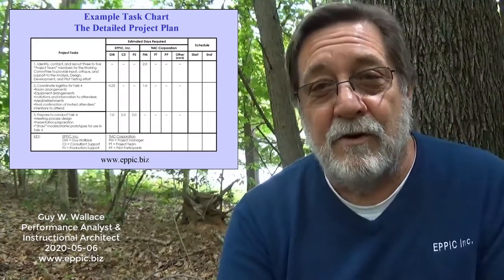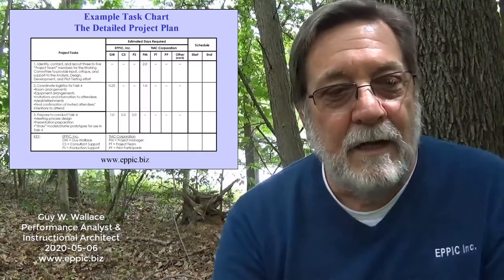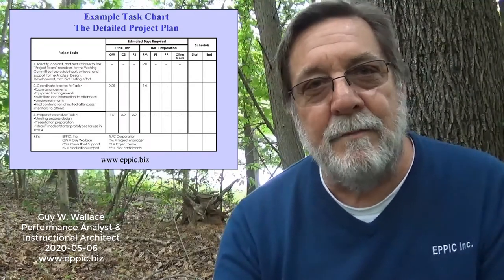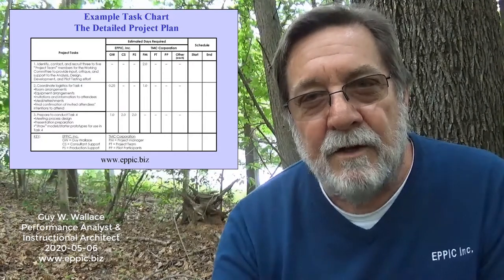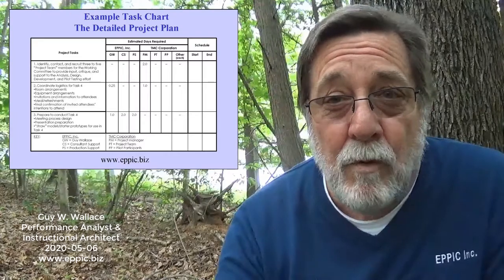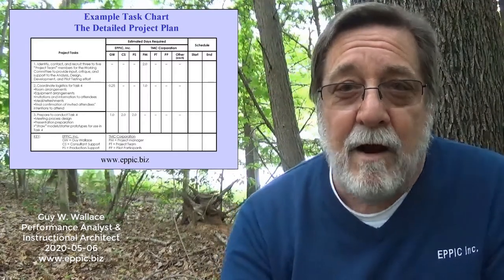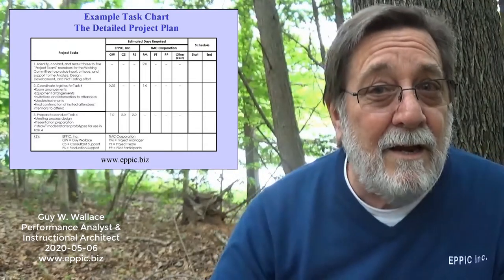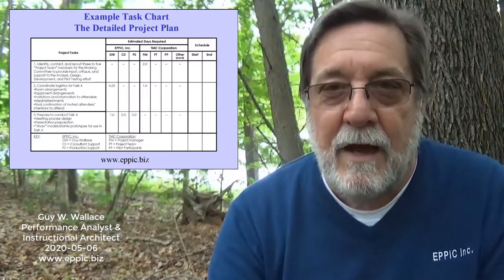I mean, all the tasks are critical, but you really have to hard schedule some things. If you want to have a project steering team get together to review the analysis data, that's got to be on everybody's calendar weeks and perhaps months before it actually happens. Because you might say, okay, we'd like to do this three Fridays from now, can we? No, you're all busy, so the next Friday, oh no, the Wednesday before that, yes, we can, so let's pick that Wednesday.